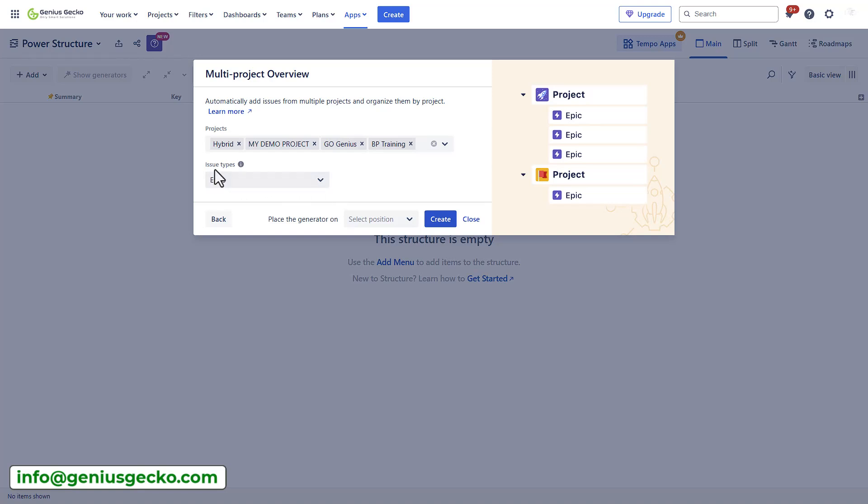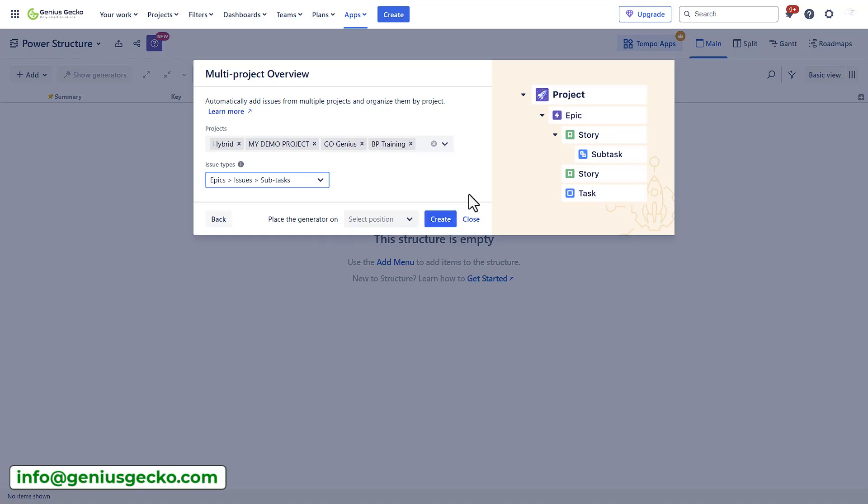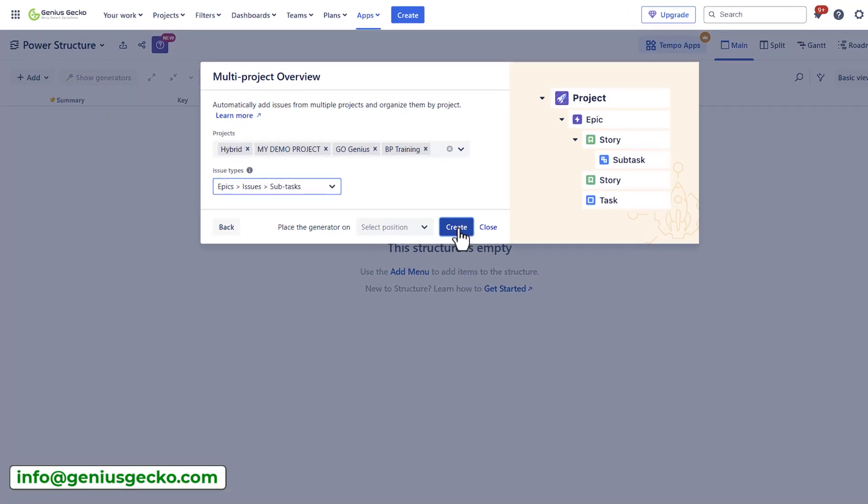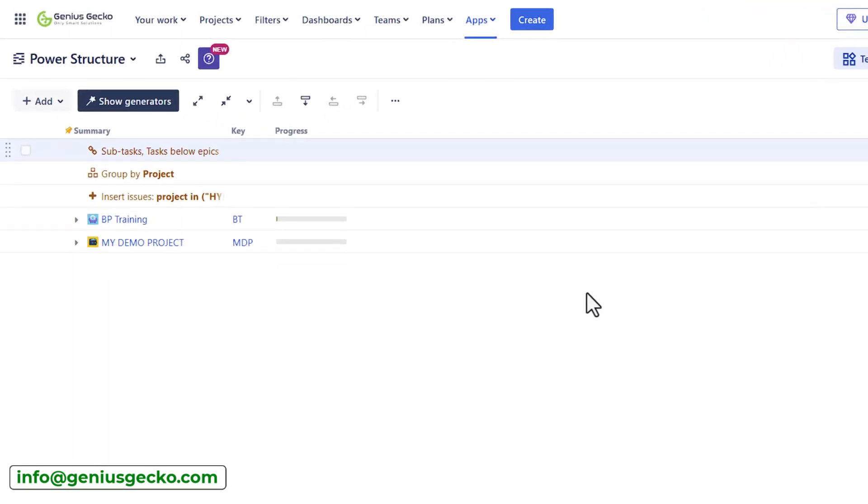Now I can decide what level of information I want to include. Right now I'm pulling only the epics, so it will be a high level overview. However, I can select epics and issues just below the epics, as well as the subtasks. Let's select it. And the structure preview is shown on the side right here. Let's hit create and have a look.